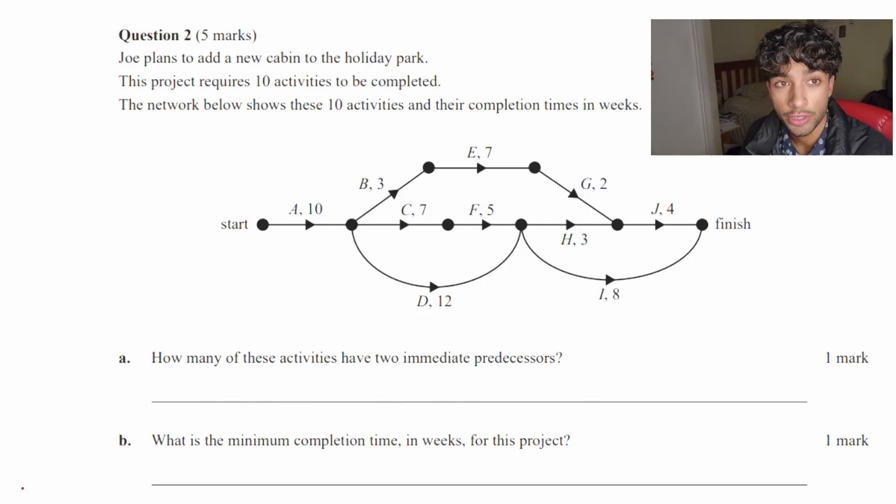Now this question is from the VCAR 2022 exam, exam two, and it is question two. That's a lot of twos. But anyways, so we have a project type question where it's a digraph. And question 2A says, how many of these activities have two immediate predecessors? So when I think predecessors, I think it's best to start from the end and then go that way to the start.